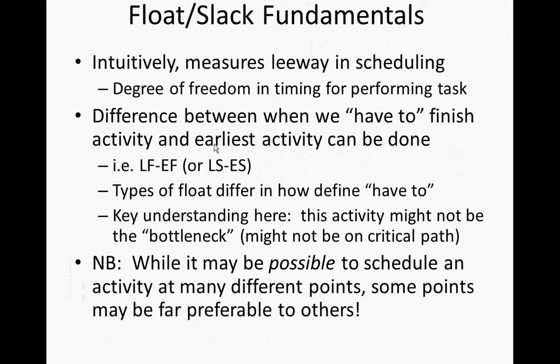In software available these days, with start-to-start dependencies, it can be defined in different ways. But here we can compute it either with late finish minus early finish, or late start minus early start. It's going to be the same for both of those. When you have those different types of dependencies, it's different.